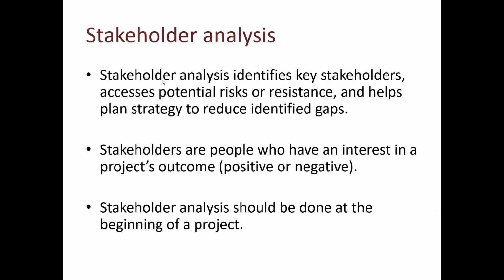I'm back. Just switched to another router to avoid any problems. So, back to Dina's question. No, those people will not carry out the process or the project, if you mean that. The project will be carried out by a cross-functional team, which, as we said, is two teams: the Six Sigma team, yellow, green, black, and the subject matter experts. Stakeholders are neither Six Sigma specialists nor process experts. Those are people who can block the change.